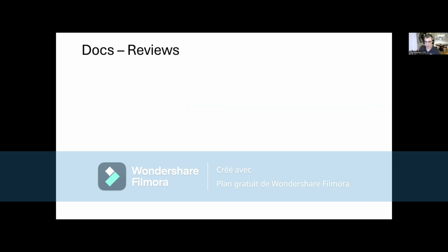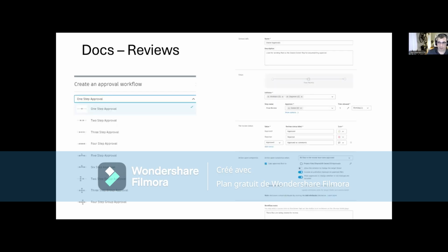All right, so I'm going to talk a little bit about reviews. The review process, very simply, is just, I have a chunk of data, I want to give it to somebody else, and I want them to review it. Or I could give that to multiple somebody elses, and they review it, right? It's also kind of used as a poor man's submittal, right? Because Autodesk Docs is very cheap to get into as far as how expensive Autodesk products can be. So you can create and pre-configure review settings, and these tie into your permissions. And we'll dive into actually the creation of a review process here in a second.